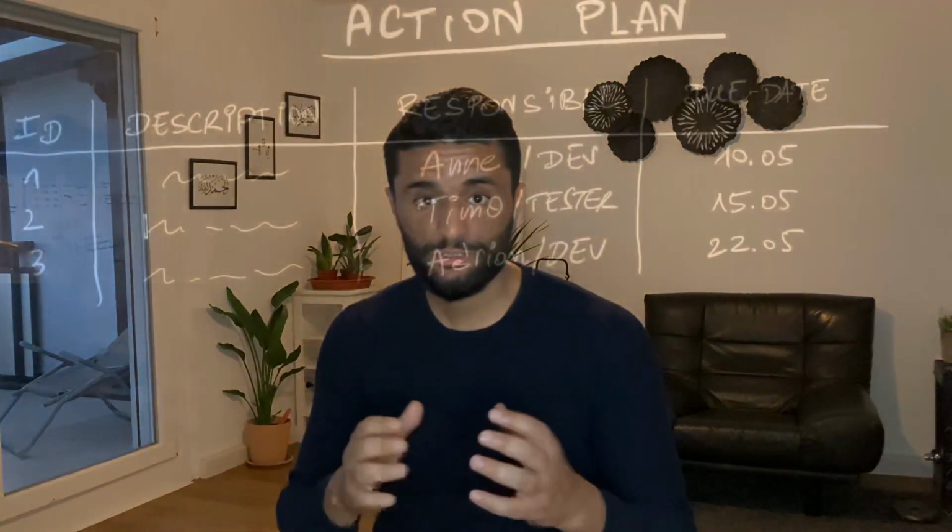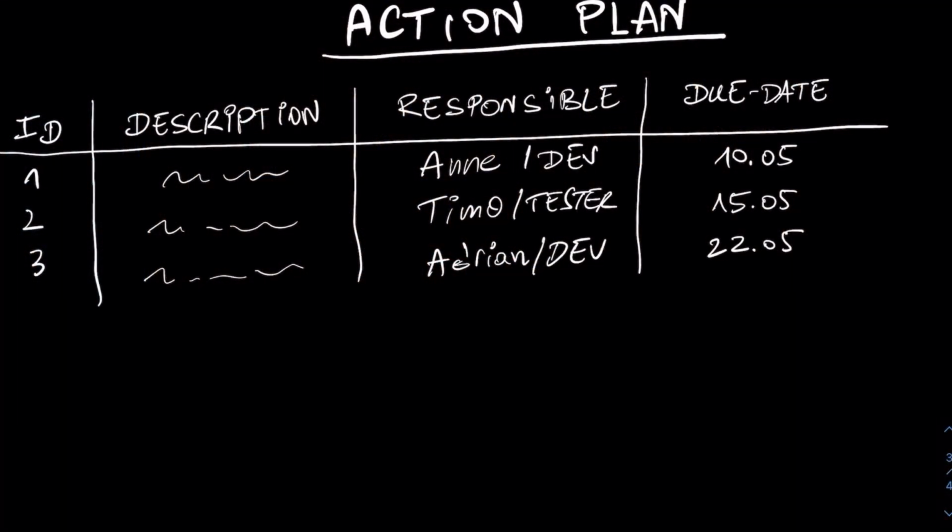And almost 10 minutes before the end of the meeting, I would ask the team to stop the discussion, and I would share again my screen and show them the meeting minutes. And most importantly here is to get, as a project manager, the feedback and the commitment from the team members. The feedback might be, for example, to adjust the description of a certain action item, or to adjust the responsibility, or to negotiate a little bit maybe the due date that I have predefined based on my estimation.